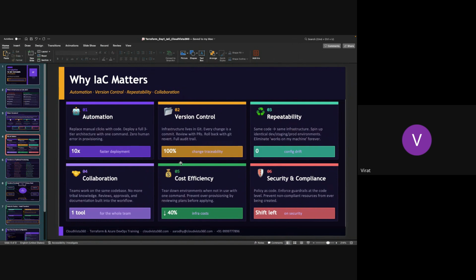In that case, 60 hours will be assigned to you. And in 60 hours, you have to do the Terraform module for the storage account. Okay, there would be no micromanagement. And what you are doing in 60 hours, someone is going to ask you in every daily Scrum call. You will just say if you are having any blocker in the development or not. That's it. If you're having any blocker, you raise it to the Scrum Master. He will arrange some SME for you to fix it.